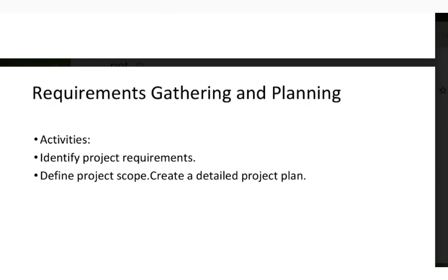Define project scope, outline scope boundaries. We clearly define what will be included in the project and what will not. This helps prevent scope creep and ensures that the project remains focused on its primary objective. We also need to set deliverables and milestones. We specified the key deliverables, such as completed features or phases of the application, and established milestones to track progress throughout the project life cycle.